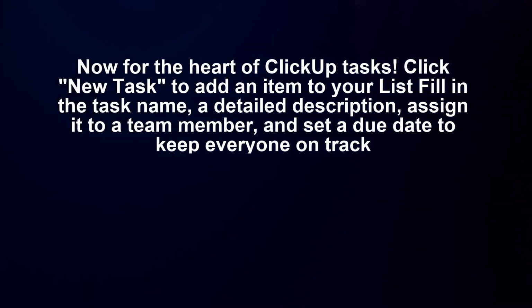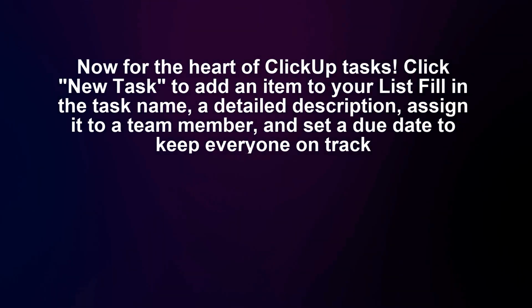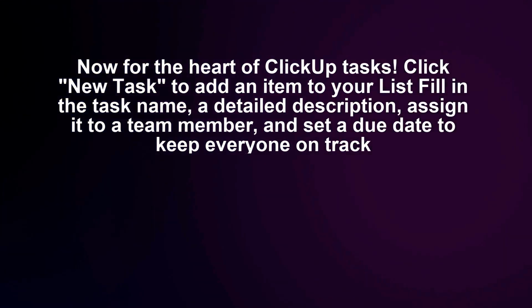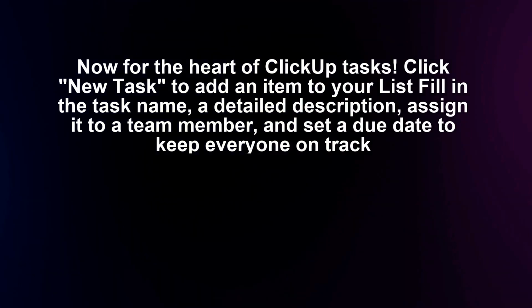Now for the heart of ClickUp: tasks. Click New Task to add an item to your list. Fill in the task name, a detailed description, assign it to a team member, and set a due date to